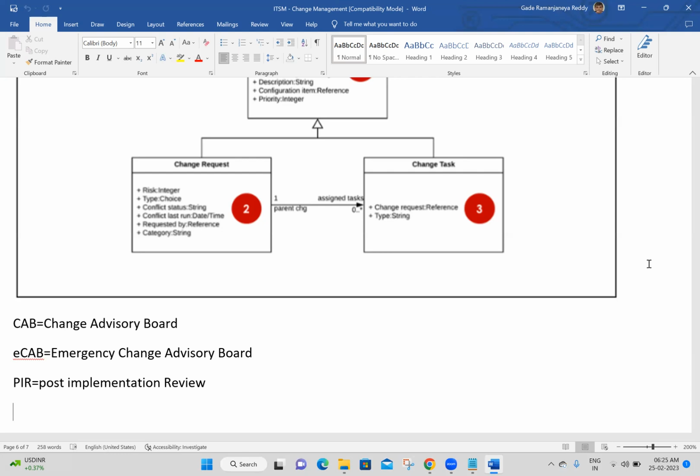Within release management, we will create a change request and implement all the tickets completed in sprint 1, sprint 2, sprint 3 to the production environment at a time. That is called project go live. And all those tasks are related to one particular business application.